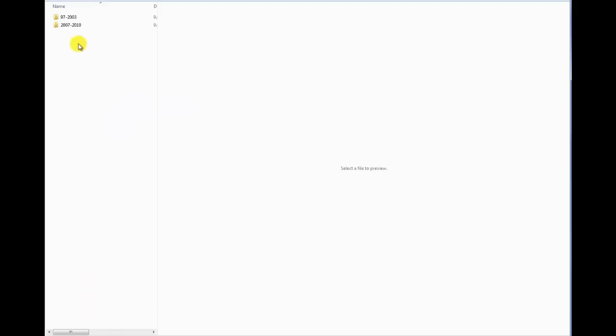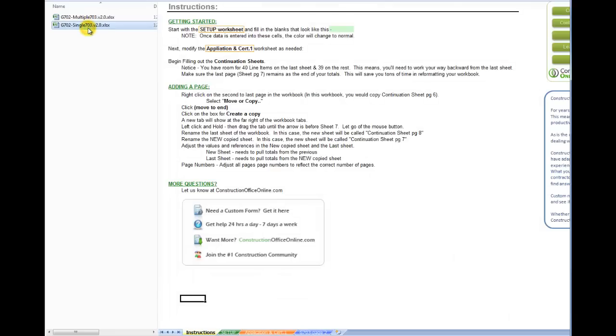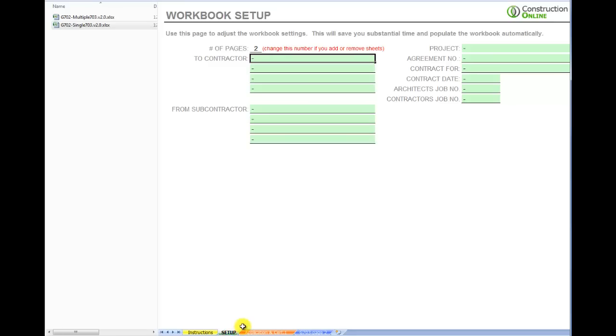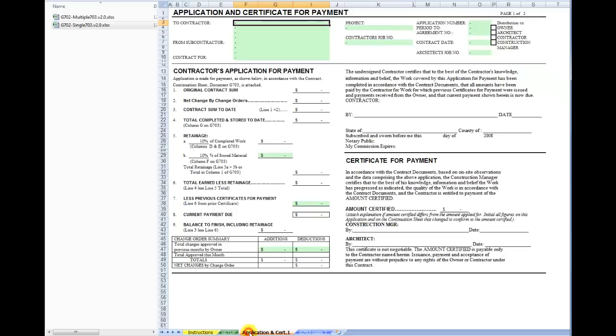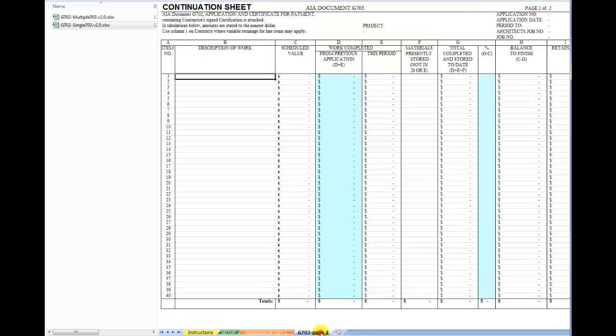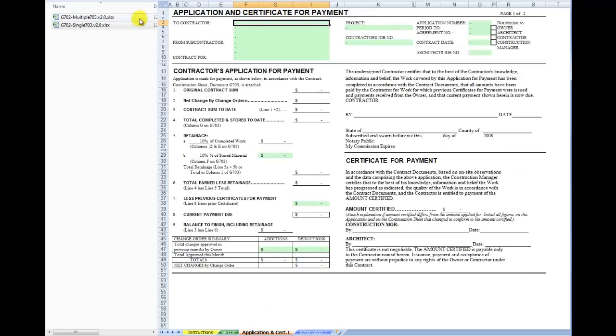G702 and G703. These are extremely valuable on commercial projects where we've got to report, submit an application for payment based on the conditions of the job. So we list the schedule of values here and then where we're at with the job and submit this on a monthly basis. Very handy to use. We used paper copies for a long time and decided let's do this digitally. And now we just keep a copy for every month of billing on the job. It's especially helpful on larger projects.